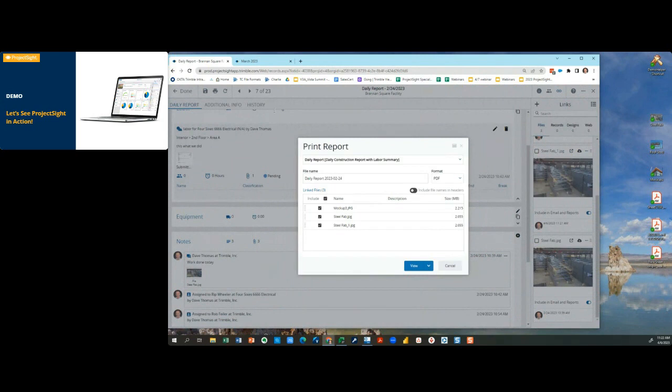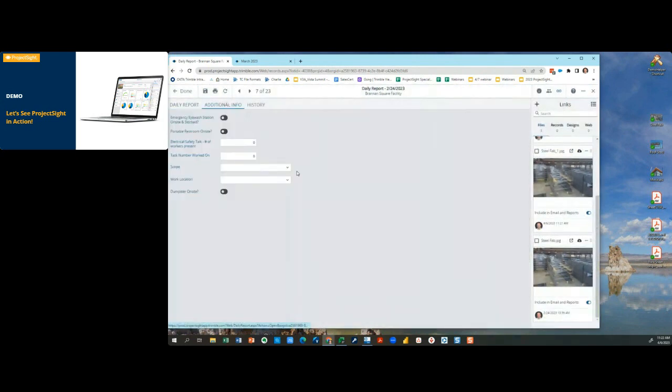That's right. All right. And Rob's mentioning tracking kind of the little things, right? Porta potties, dumpsters. We can track anything we want here in the custom fields tab, the configurability. Portable restroom, right? Maybe that disappears at some point. You're still getting billed for it. That's profit fade right there. That's lost dollars. Here you can track it, claim, say, hey, that vendor disappeared 2 months ago. I'm not paying for that.